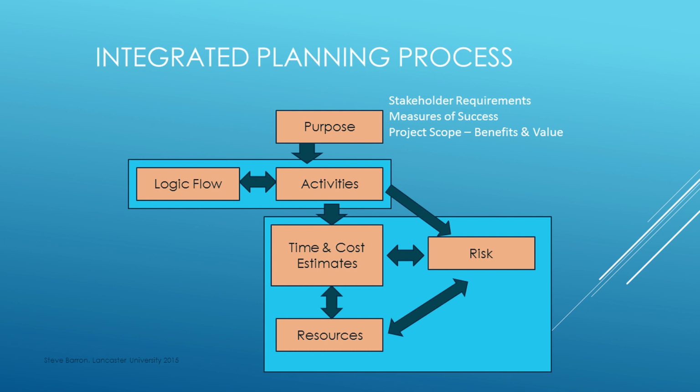We must make sure that these three components of resource allocation, risk, and estimations are balanced to satisfy the project requirements. Do we have significant risk that is unacceptable to stakeholders? Does the completion time and overall cost fit within the project constraints? Is the resource allocation fitting within resource availability to produce the necessary performance outcomes for the project? We might need to revisit each of the elements within this stage until we have acceptable risk, resource allocation, and resulting time and cost estimates.